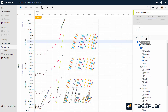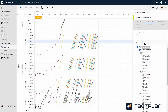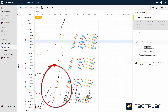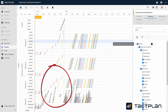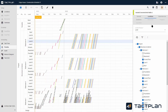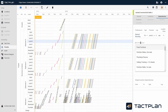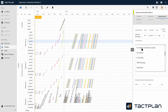It is also possible to split your tasks and then merge them again. If you click on Dependencies, you can select predecessors and successors for the tasks. The way dependencies work at the location level is unique in TagPlan and will be explained in a later training video.